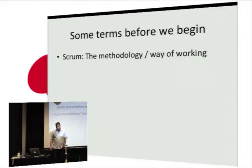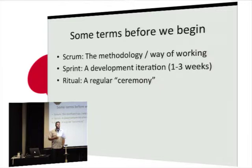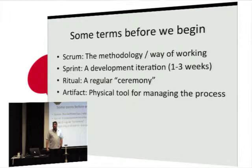Some quick terms: Scrum is the way of working. A sprint is a period of development, usually one to three weeks depending on the organisation and technology stack. Scrum rituals are regular ceremonies you perform throughout the sprint, and Scrum artefacts are physical tools, usually for managing the process.